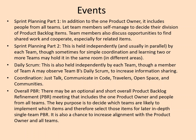Sprint Planning Part Two is held independently by each team. In Sprint Planning Part One, the whole team decides which functionality they are going to work on. In Sprint Planning Part Two, the team takes the functionality they selected and each team member picks up small tasks and starts working on them.